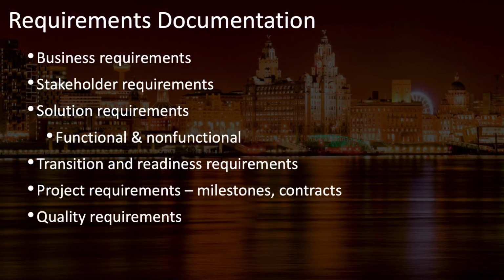Now we're going to reverse engineer what the inputs are for collect requirements by looking at the outputs. First, the requirements documentation. Remember what's in the requirements documentation, that it includes business requirements, stakeholder requirements, solution requirements, transition and readiness requirements, project requirements such as milestones and contract obligations, and quality requirements. Now, where will you find all of these kinds of requirements?